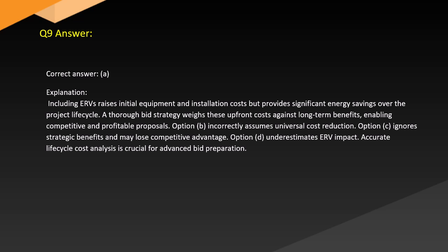Answer. Correct answer: A. Explanation. Including ERVs raises initial equipment and installation costs but provides significant energy savings over the project life cycle. A thorough bid strategy weighs these upfront costs against long-term benefits, enabling competitive and profitable proposals.